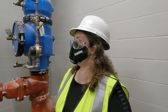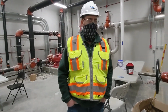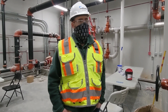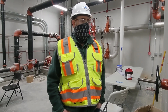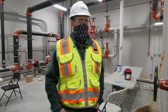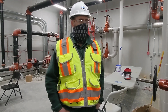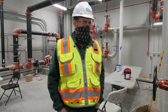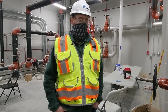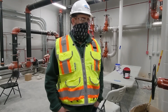So going off of that, what are some advantages of civil MEP planning during the process? Yeah, so the point where it really impacts the mechanical system in a building is when you're tying in your domestic water, tying in your storm system, getting permanent power to the building. These are all things that you do on a temporary basis as the job starts, and it's just really essential to have those coordinated because you can be ready in the project proper, but if you don't have the utilities lined up, that can really put a damper on your schedule. For domestic water, you're flushing and filling all the systems to clean them out ahead of time. And with the permanent power, there's some equipment that you can't start up on temporary power because it's too sensitive. So you really have to carefully consider and plan out your coordination with the utilities to the building.